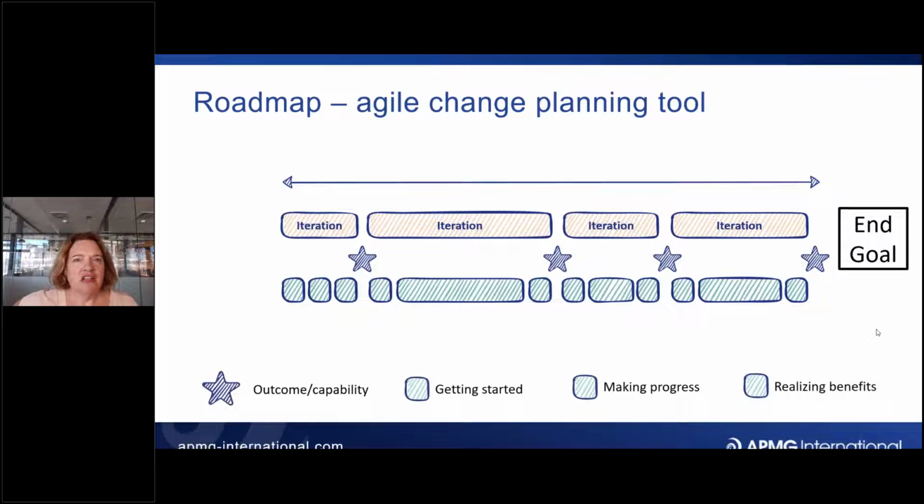You can divide up each of those iterations, whether they are a few weeks or a few months. We're not talking here about sprints, by the way. A sprint is often between 2 to 4 weeks, delivering a specific thing, and then we go on and do the next one. An iteration is more about putting several sprints together, probably no more than about 14 weeks, because thinking about the brain and how it works, the further out we go, the more fuzzy it becomes, the less urgent it becomes, and that's a very dangerous thing.